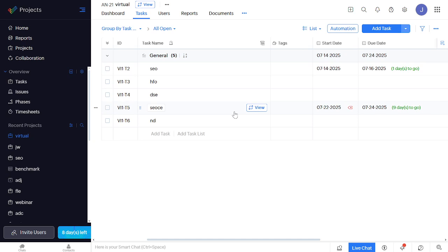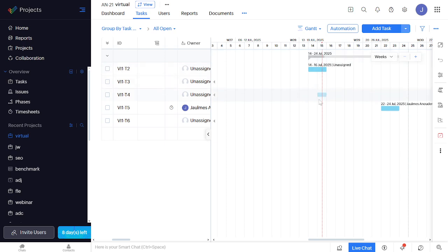Click on Gantt View under the Task tab. This helps us because Gantt View gives us a visual representation of our project timeline, showing task dependencies and progress. With your tasks listed on the left, start dragging the bars next to each task to set their duration. Adjustments can be made easily by dragging the edges of these bars.